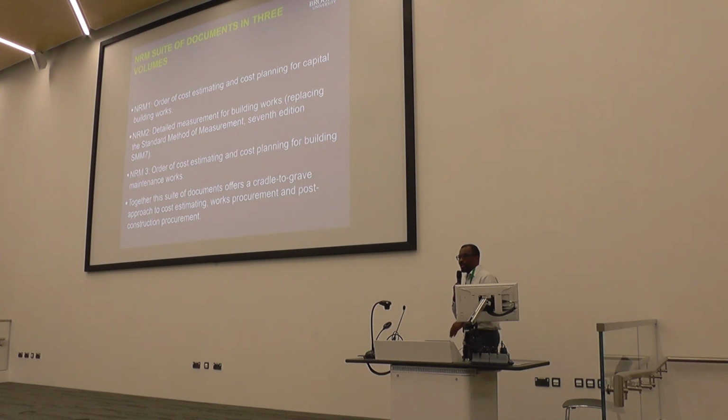So if you go onto the BCIS database, what it does is aggregate cost elements of different work items: offices, retail, mixed-use development. There are different buildings there, and it's able to tell you that, okay, if you take maybe an office building, the average cost of constructing an office building per square meter is maybe £500 or £200, right? So NRM1, in conjunction with some of these databases, helps you to pre-estimate the cost of the project when you have very minimal detail.